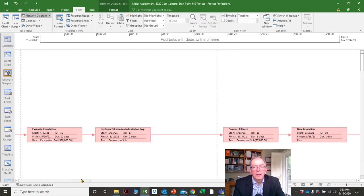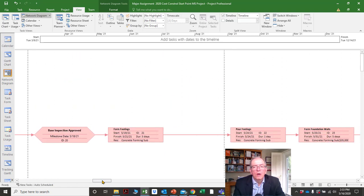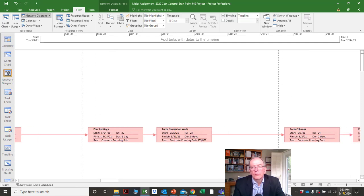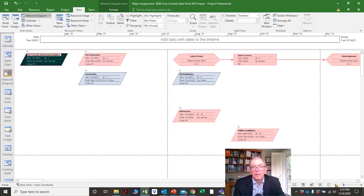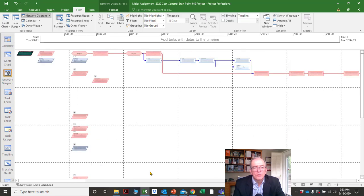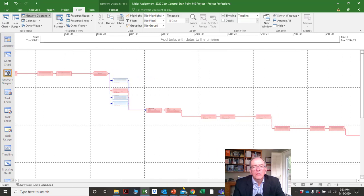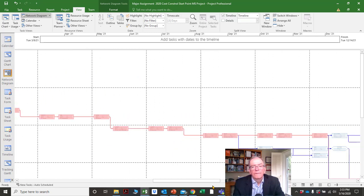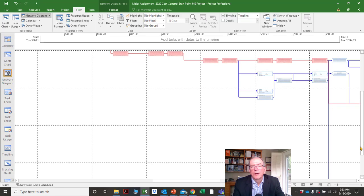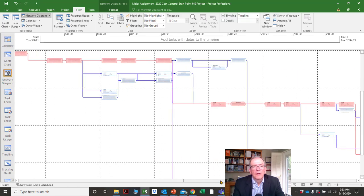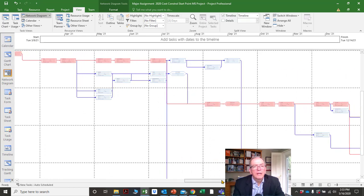An open end could mean your critical path is not correct if you haven't properly done the schedule logic — what happens before what. That would be a problem. This is a great place to review whether the schedule logic makes sense.